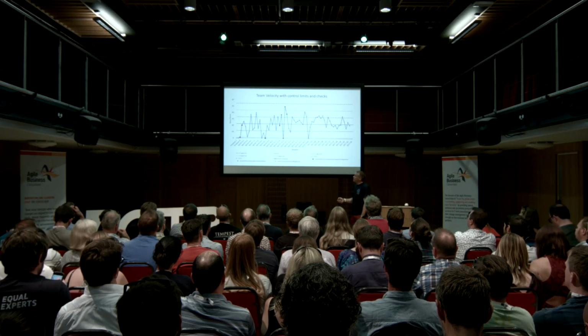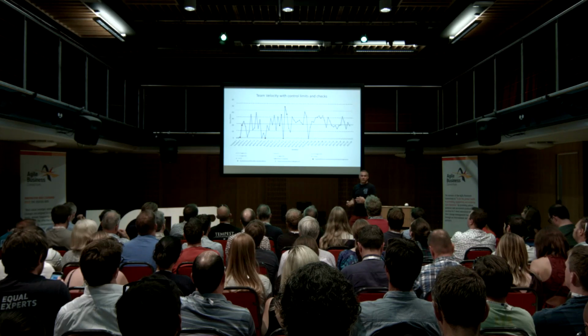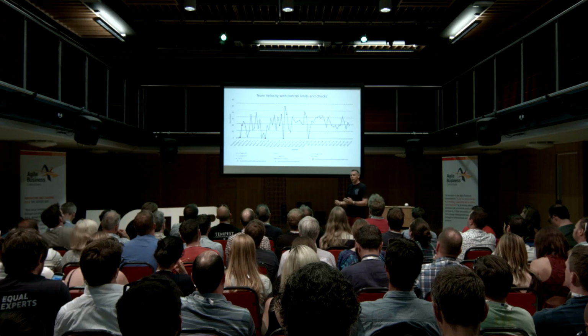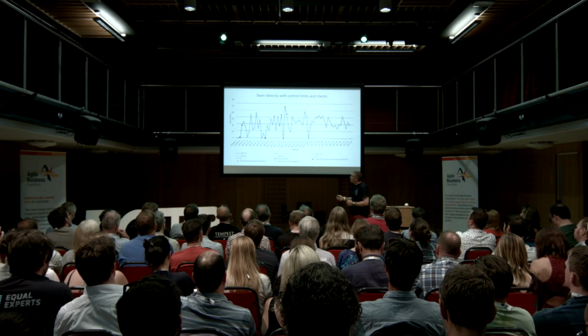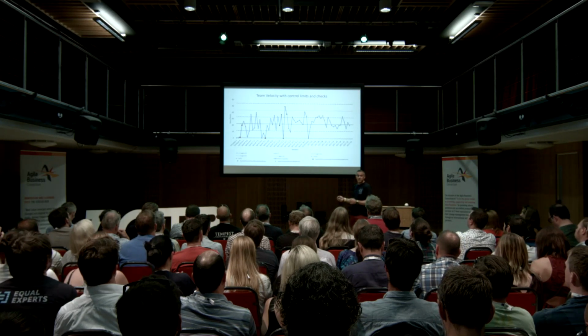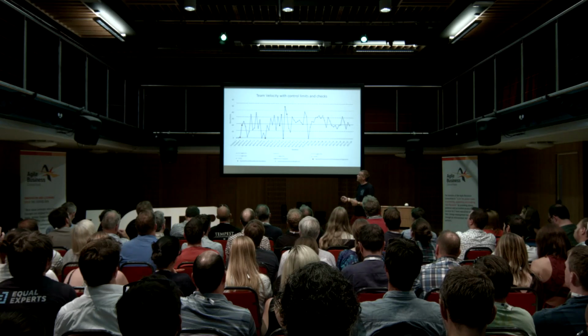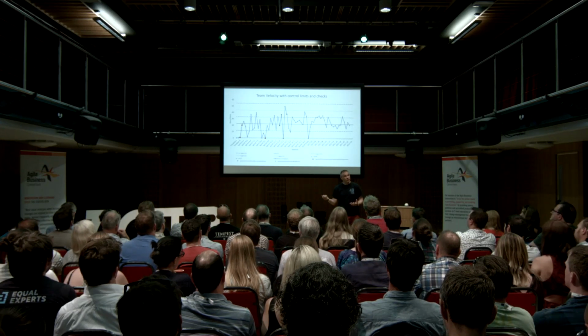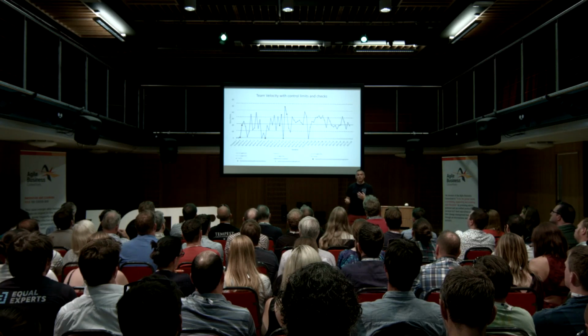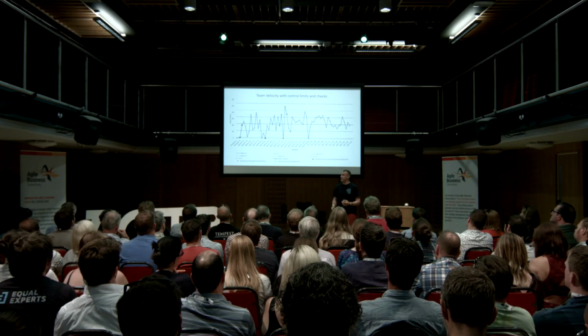Now, these ones, we're not quite so concerned about. They're right at the start of the project. I think that's quite normal, that you'd end up with a low velocity as you ramp up. But it's interesting looking at these ones, where we suddenly drop down. This could be a point where we would highlight this and raise it in one of the retrospectives and say, well, this is interesting. We've got this data. Have we got any ideas why this has started to happen?